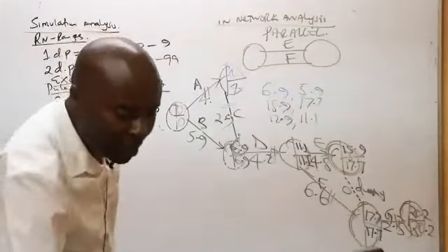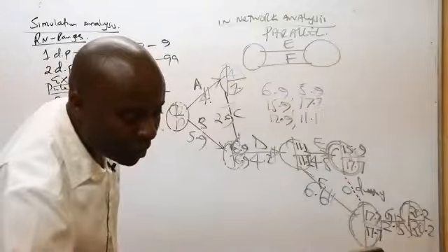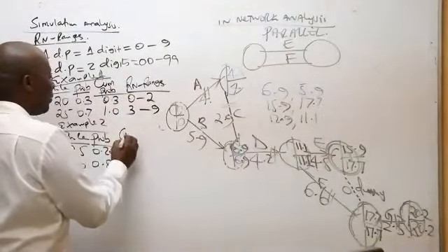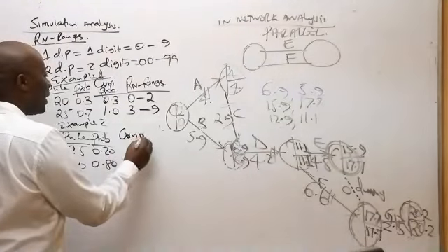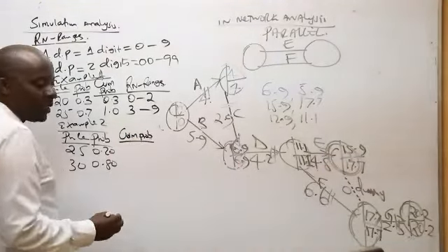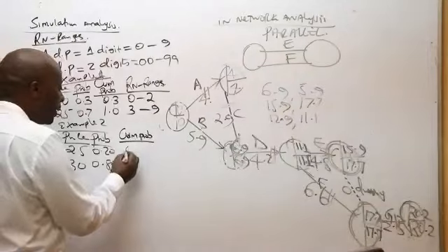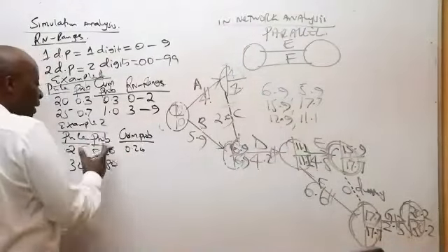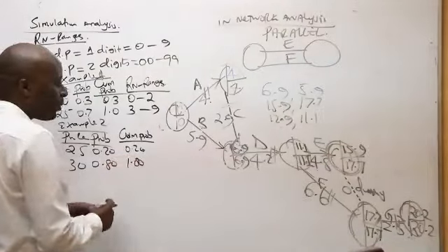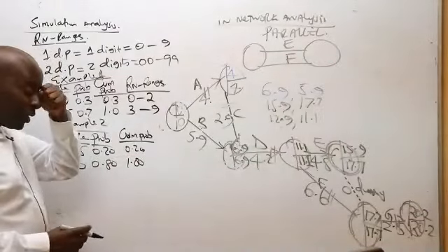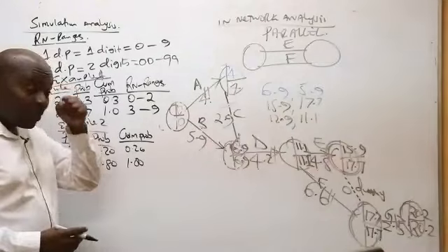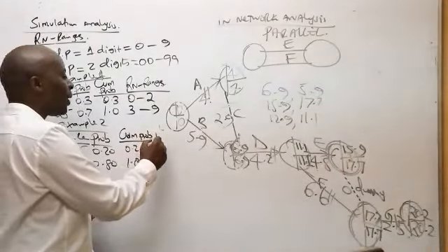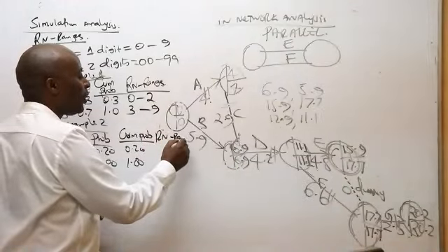What they're telling me is that Mwalimu, first of all, let's get cumulative probability. So we have here cumulative, it will be 0.20. We are accumulating, we are adding. So when we are adding, this will be 1.00. Remember, we must be very sensitive to the decimal places. After that, now I'll be able to generate my random number ranges very comfortably.